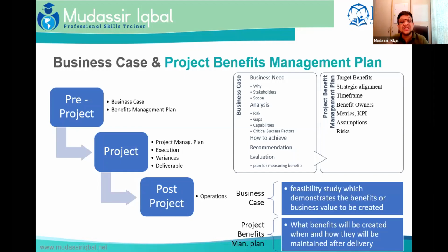The project sponsor is generally accountable for the development and maintenance of the business case document. The project manager is responsible for providing the right recommendation and oversight to keep the business case intact, and most importantly, keep three documents aligned with it: the project management plan, the charter, and the project benefit management plan. So these four documents need to remain aligned with the execution of the project.